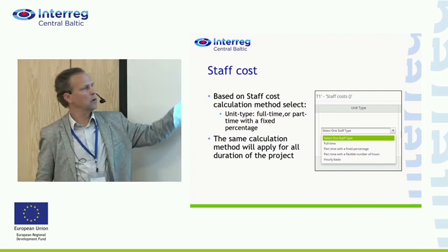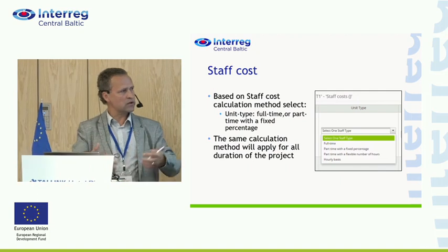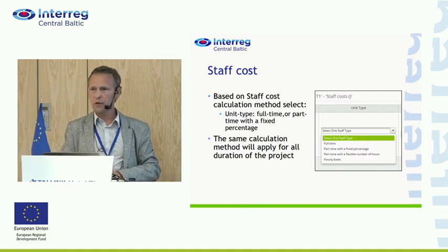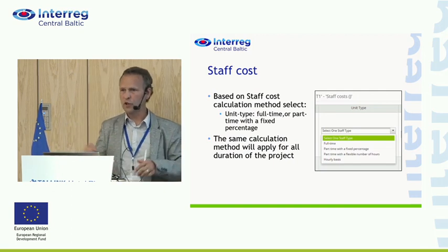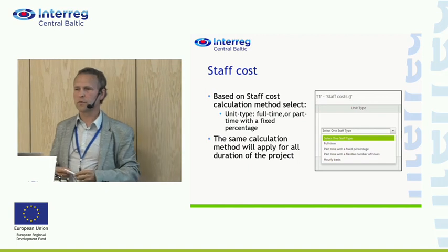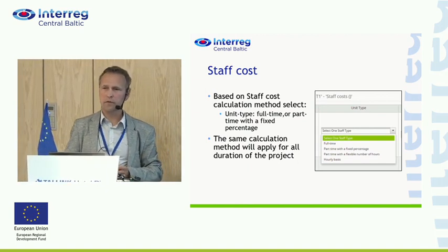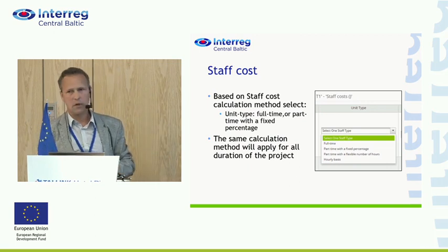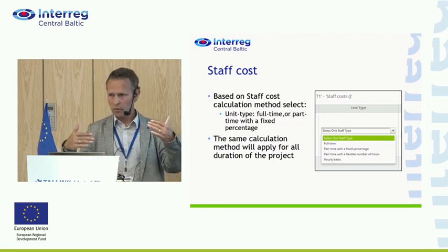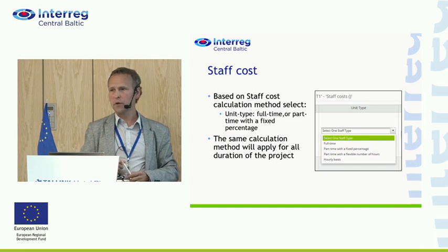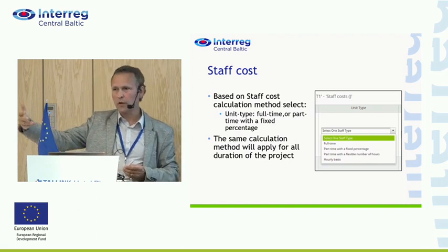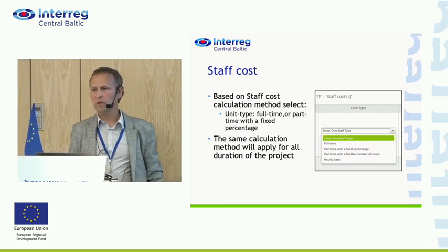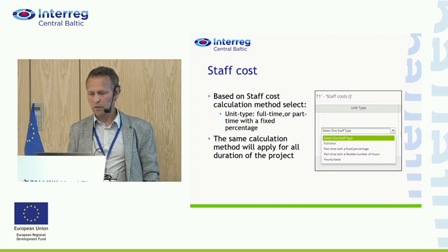Very important to note here also that the same calculation method that you used in the beginning of the project when you made a contract with a person, you follow the same calculation method during the whole project, that you won't change. Although it was maybe more of an issue with these hourly rates previously. Now if it's a fixed percentage, maybe it's not even so big an issue anymore, although the share might change. If you want to change the share of work time, then inform us beforehand that you see a need to change some responsibilities, and then it can be decided and solved.